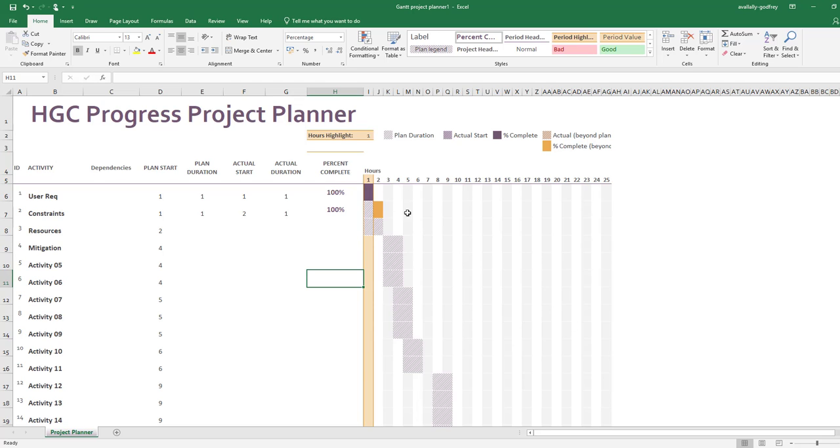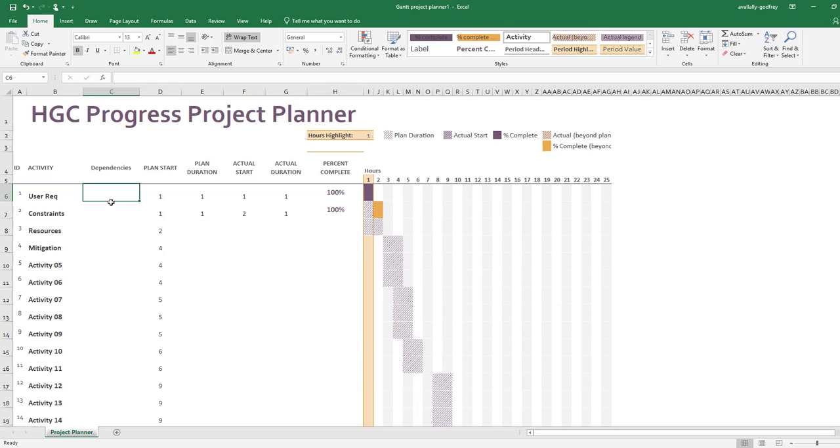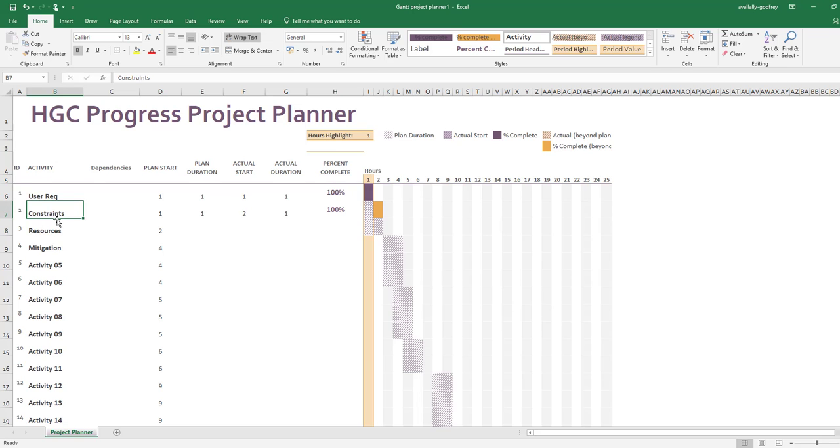One last thing before I go: about dependencies. Dependencies mean that that task, that activity, can't be completed without a prior activity being completed first. The analogy I can give is you can't build a house until you've built the foundations. So the building of the actual walls of the house can't be built until I've built the foundations beneath the ground.